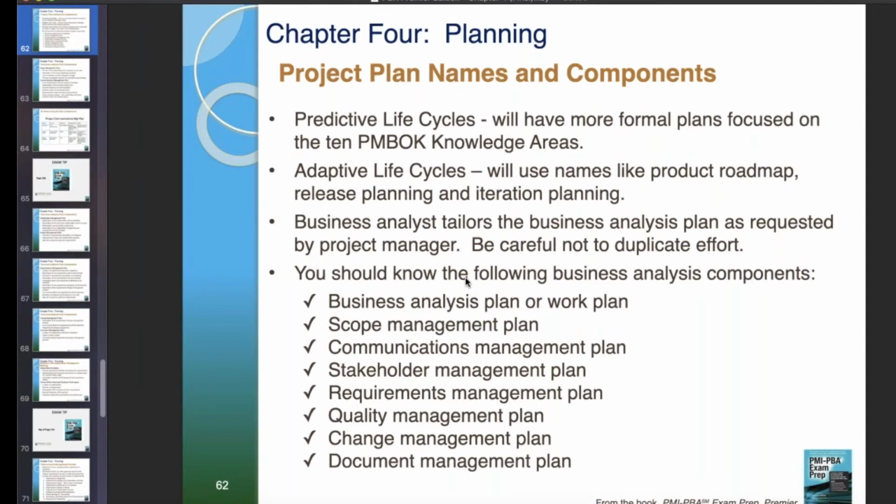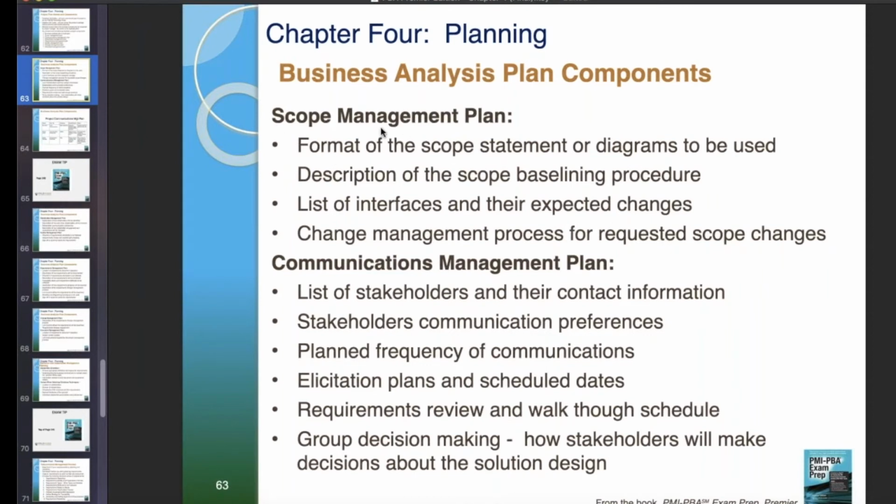You should know the following business analysis components. Business analysis plan or work plan, those are synonyms. Scope management plan, communications management plan, all the rest of these management plans. Stakeholder, requirements, quality, change, document management plan. So the scope management plan, we'll discuss each of these here. Format of the scope statement or diagrams to be used. Description of the scope baselining procedure, list of interfaces and their expected changes, change management process for requested scope changes,